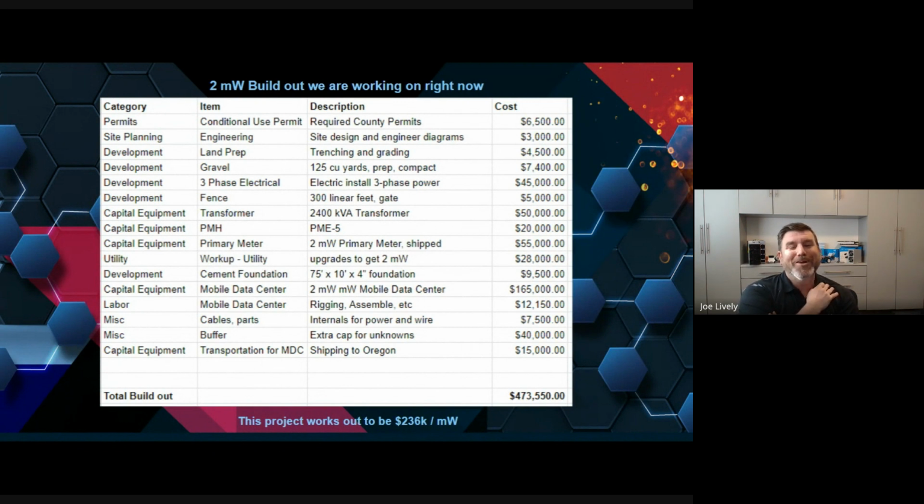The actual hooking up of power for my electrician to go through and run this was $45,000. Now that includes my runs of the cable. I'm using copper, and we've reduced the length that we're going to run it as part of that process. But yeah, it was 45 grand all said and done for the electrical contractor to be able to do that. That's not trenching or any of that other stuff or the conduit. I'm covering those costs independently.